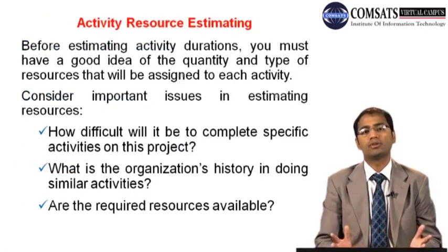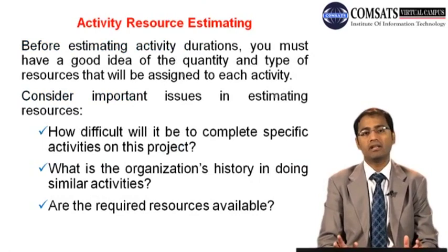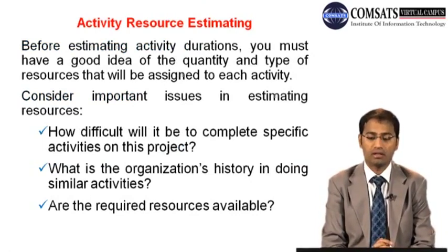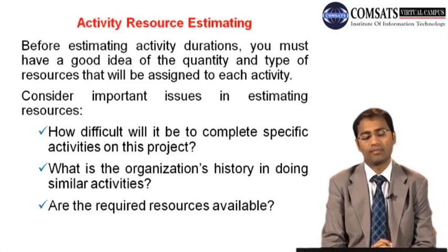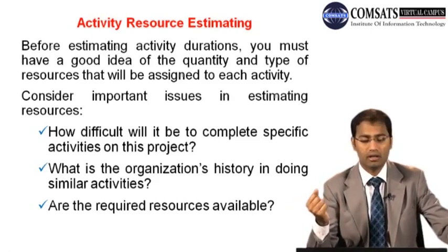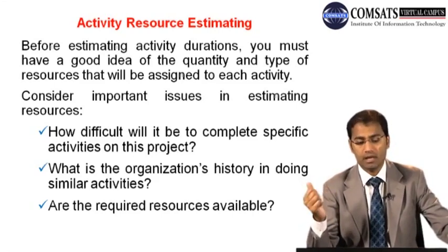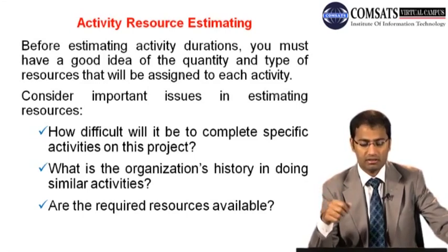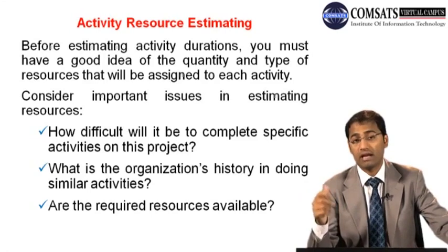So, resource estimation. Before estimating activity duration, you must have a very good idea of the quantity, quality, and type of the resources that will be assigned to each activity. Consider important issues in estimating resources, and what these may be. How difficult will it be to complete specific activities on the project? What is the organization's history in doing similar activities? Are the required resources available? Now that is very important.